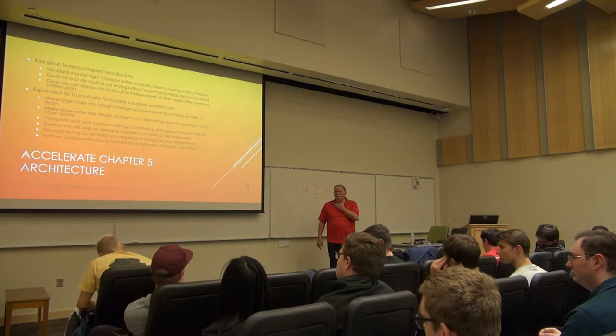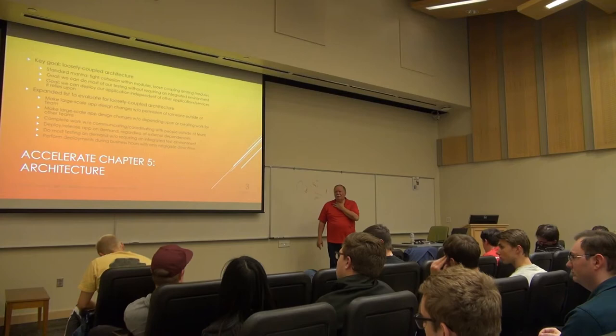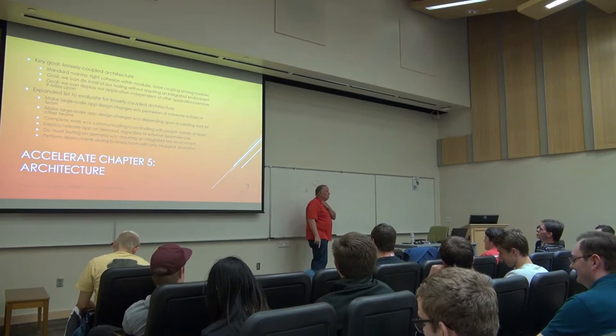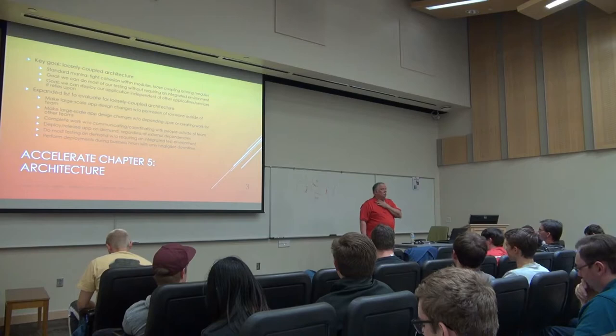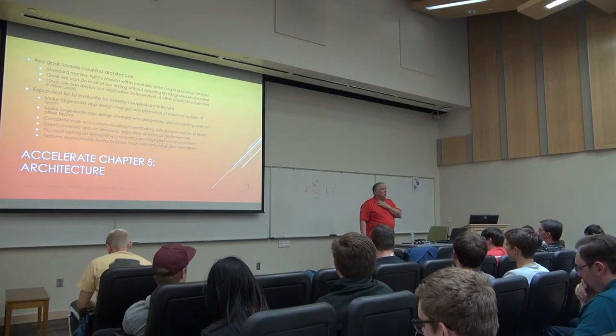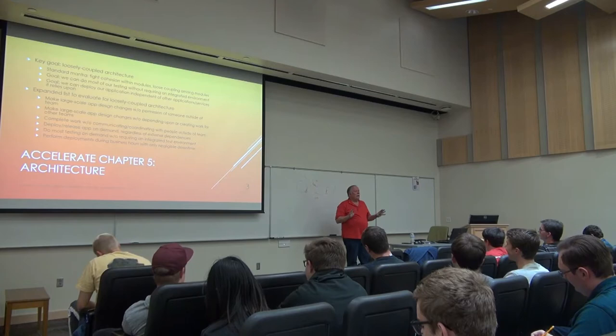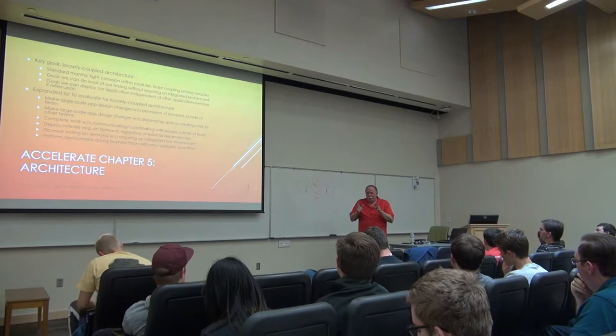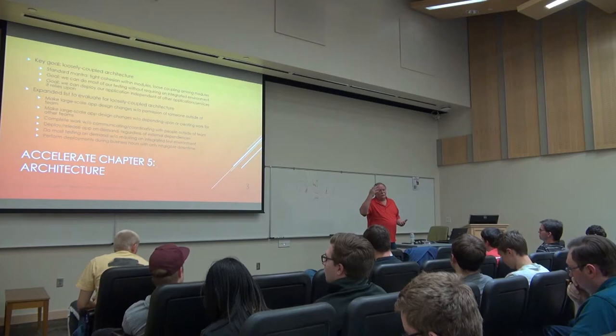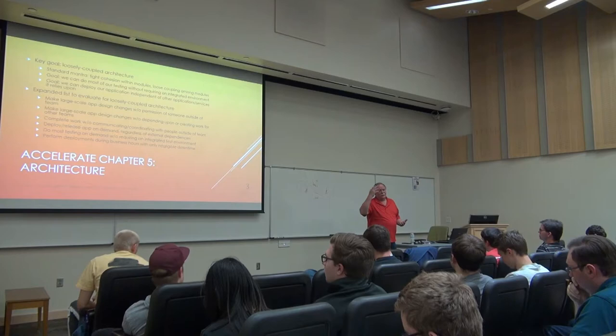I think it's Amazon that has the two-pizza rule - no team should be large enough that two pizzas can't feed them. That is an excellent rule. You don't want big teams, you want small teams. If you take this overall architectural approach, that allows you to create small teams that can work as a tight team. The ideal team size for software is about three or four people. But if the task is big enough, that's something Brooks addressed early on in Mythical Man-Month - how do you organize it? I'd say three pizzas.